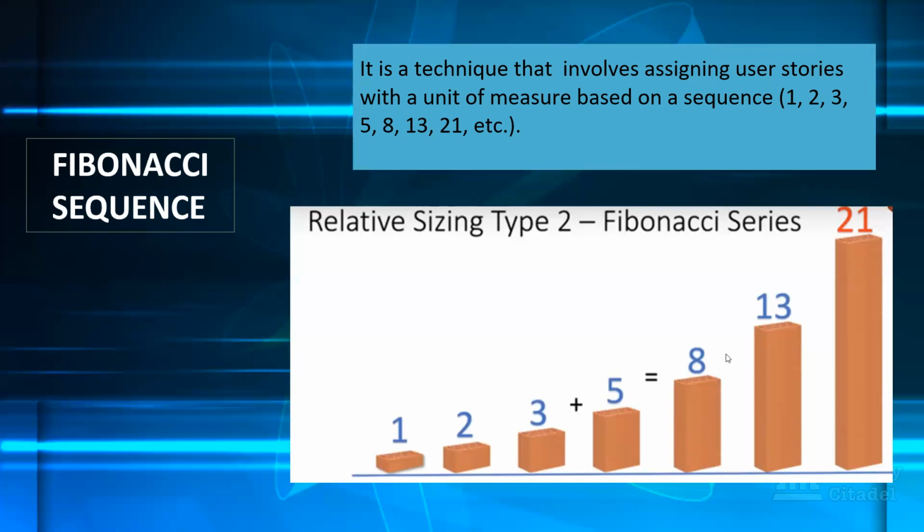So for your team, it could be that your red starts from 13. You believe any story that is 13, you know, it's just too big a story. It needs to be broken down. Maybe, like I said, two features or two functionalities have been put together on a particular story. And the developer might be able to do it and everything is fine. But the testers will feel that, okay, I need to end one journey in order to test the next journey. And as a result, they'd rather have the story broken down into two rather than having it as one. Okay, that's your Fibonacci sequence.